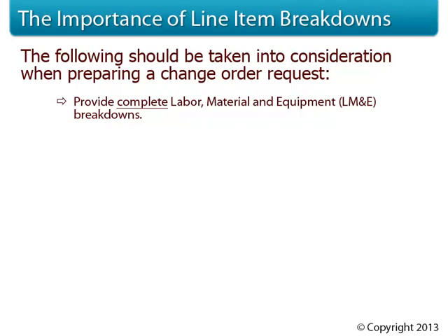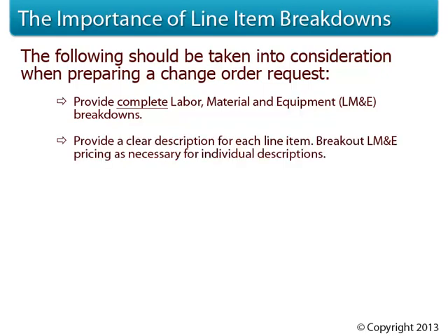And this might be as simple as stapling your notes to the back of your cover letter. Provide a clear description for each individual line item. Break out labor, material, and equipment pricing as necessary for these individual descriptions.